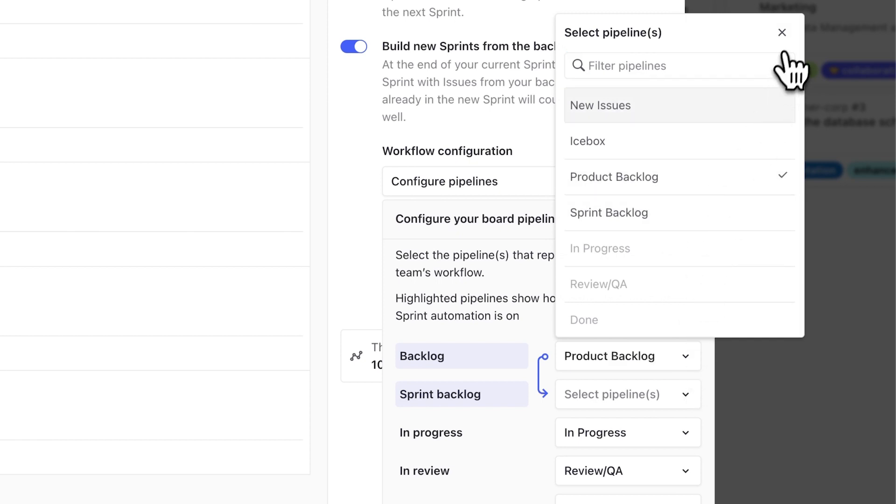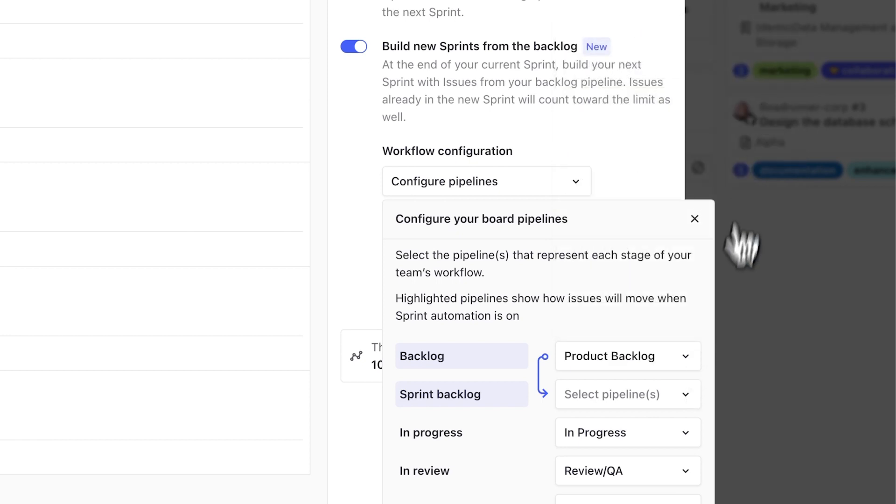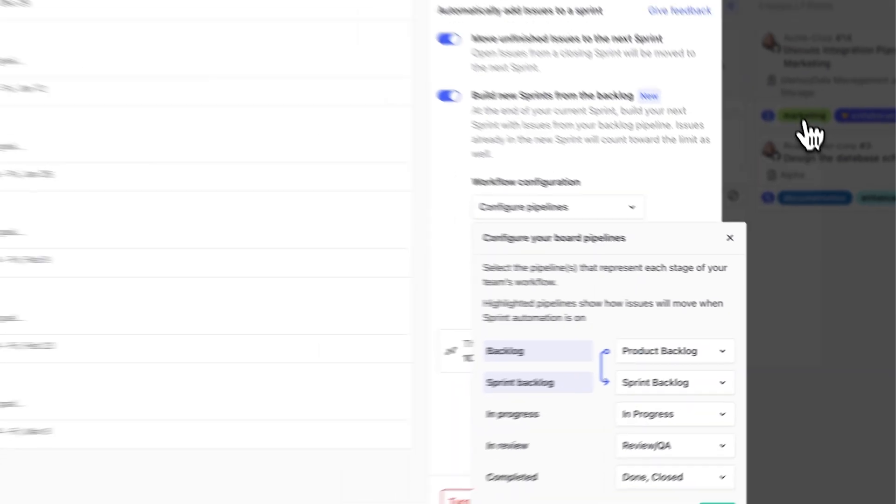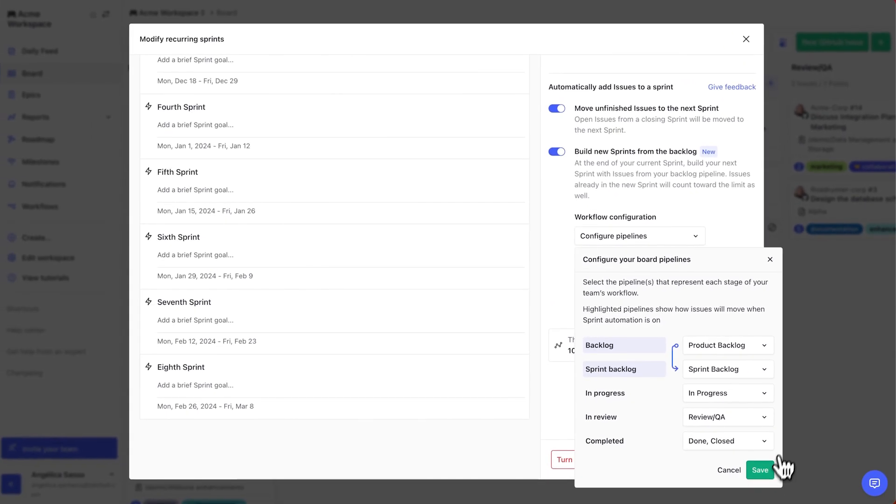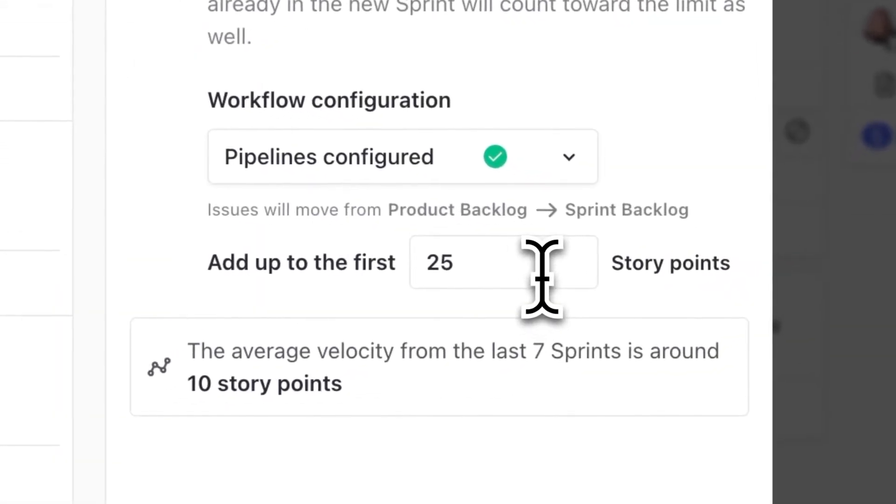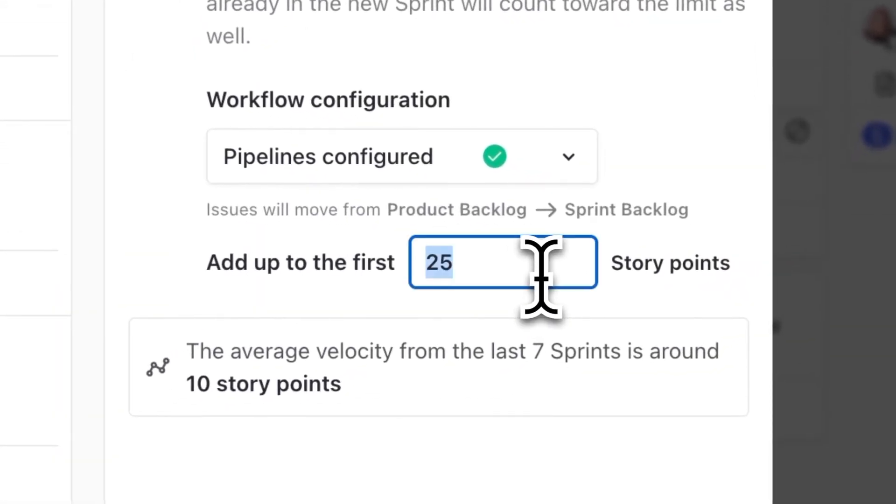If you didn't get everything done last sprint, it's not a problem. Zenhub will take unfinished work into consideration when the new sprint candidate is built. You'll never be overcommitted again. Next, set your team's average velocity and story points.